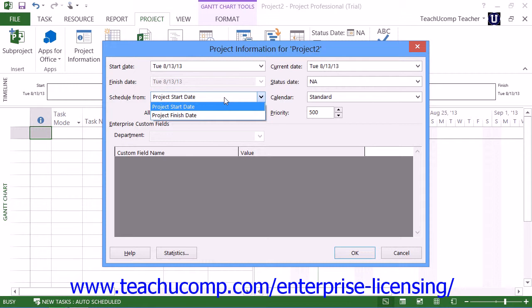Otherwise, you will probably want to pick the start date and calculate tasks from the start date to find the projected end date. Note that you only need to give Microsoft Project either the start date or the end date. It will calculate the other date based on the task workload that you enter.